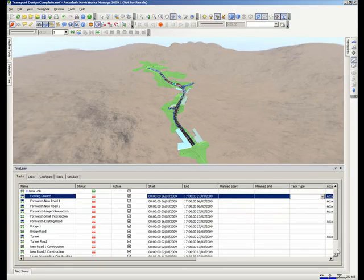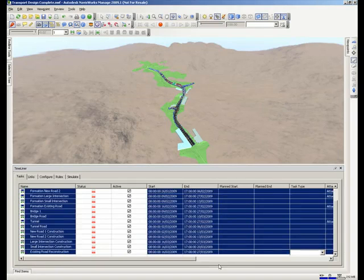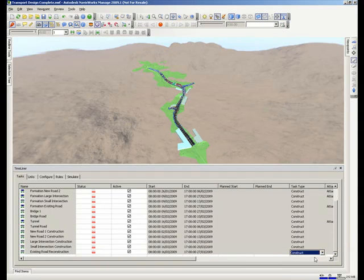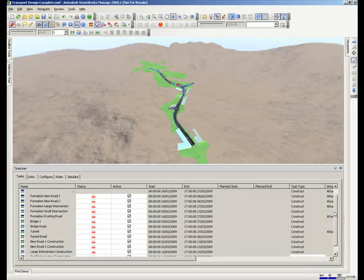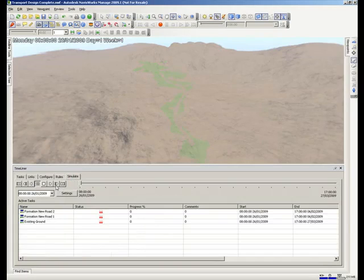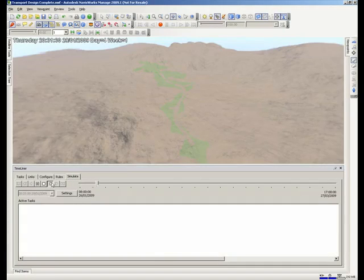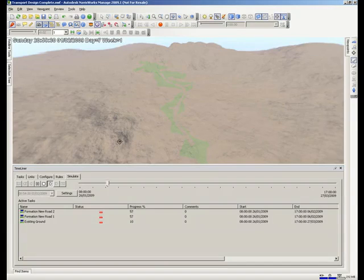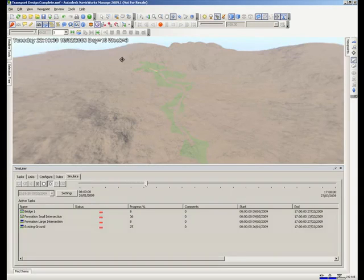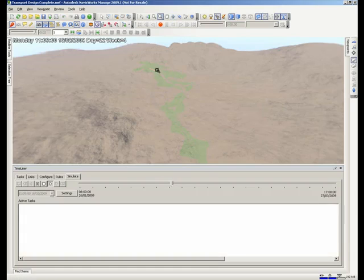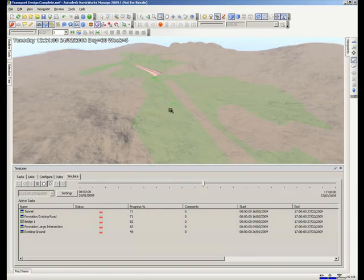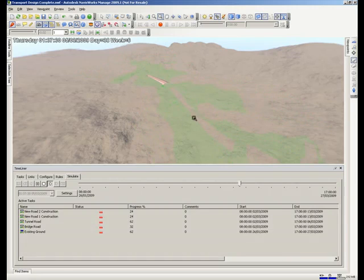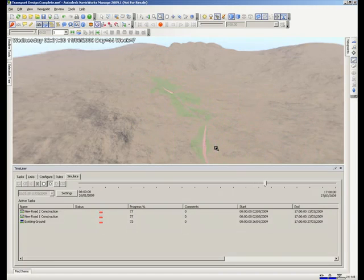A good step to start with is to select all the tasks and give them an initial task type of construct. This will give some basic display properties. So this is the initial simulation where we just set a couple of properties on objects with the link. You see the formation surface is building here. Anything in light green is something that is in progress.